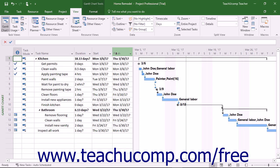The timeline view of a project file shows tasks as blocks of time allocated over the project's timeline. This view appears at the top of the Gantt chart view of a new project file. It is useful as a visual way of showing the tasks that need to be accomplished in a timeline format. It is great for inserting into other reports in Word or PowerPoint to quickly update people on the status of a project using a visual big picture that easily shows the project's progress.